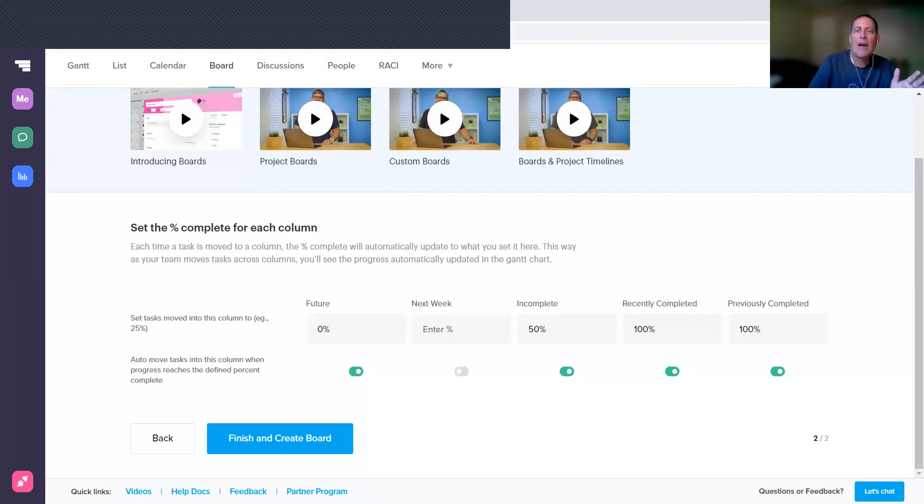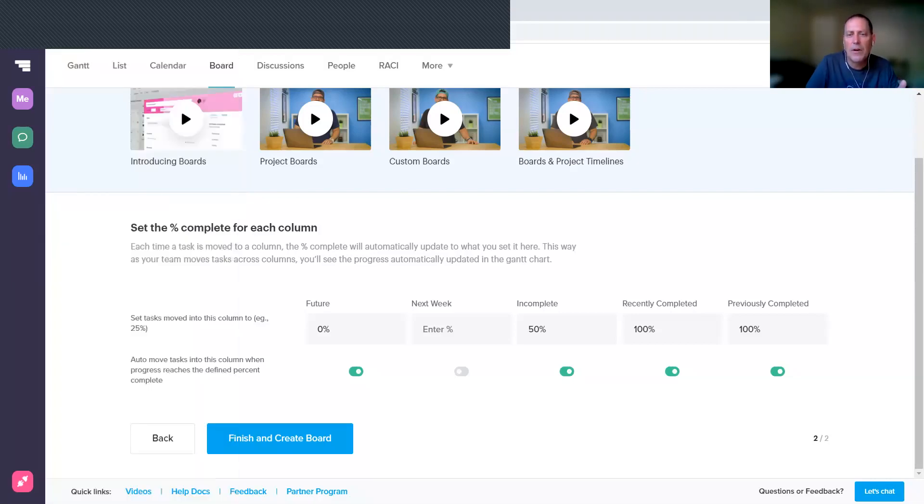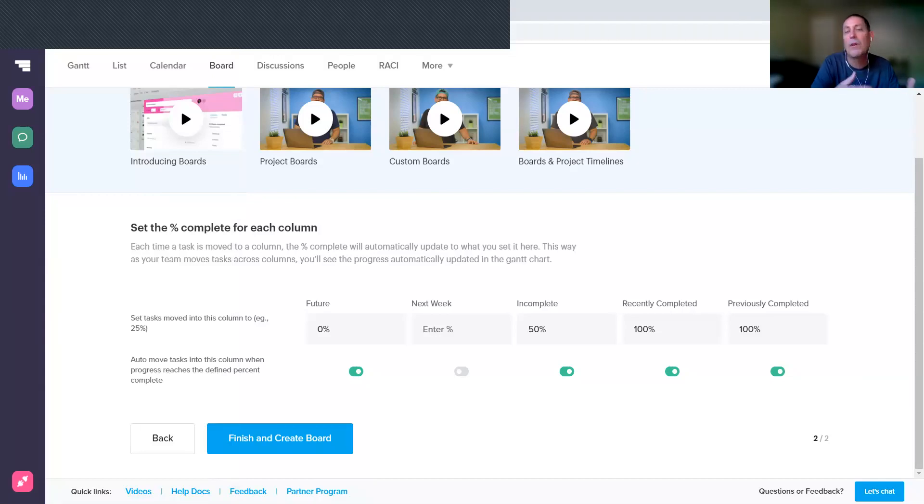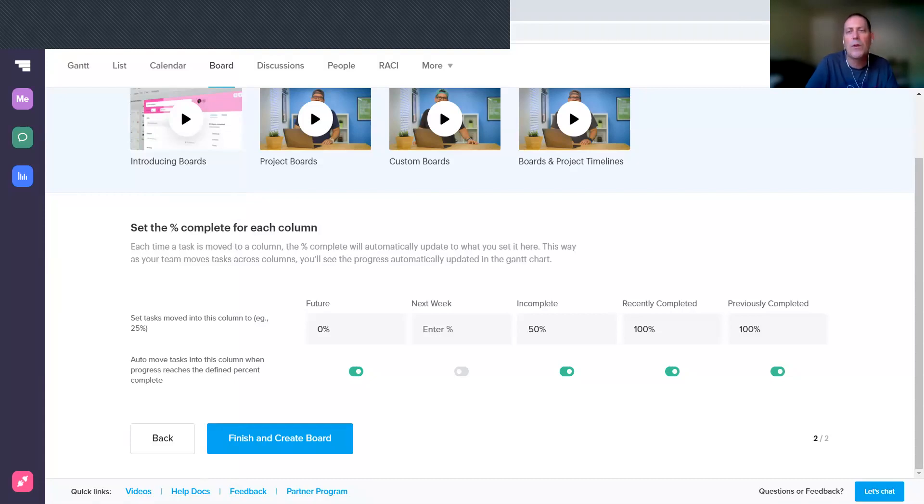I'm going to leave that for the Incomplete one—I think that makes sense. If anywhere in TeamGantt you set something to 50%, what you're saying is it's currently incomplete. Recently Completed I think that makes sense—if you are working on a task and you set it to 100%, then it should move over to Recently Completed.